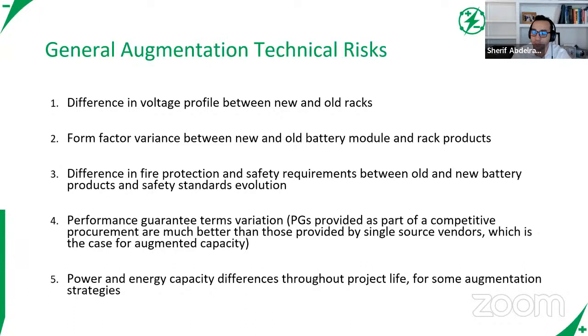In my experience, we haven't found any integrator that's willing to guarantee the performance of batteries that they are going to add 5 years from now, 10 years from now. So really, if you're planning an augmentation strategy, in most cases, you're planning for that on your own.